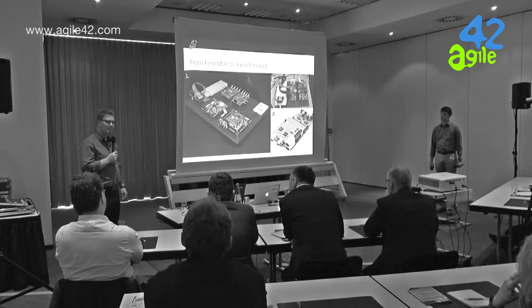So very early, they could start developing the software, the firmware, the algorithms, and sprint by sprint, since this is audio processing, whenever they reached their sprint review, they were able to hear how this product worked, because they already had the first minimal viable product.